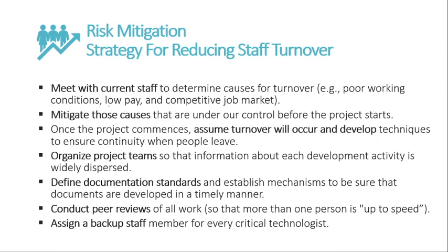It is very helpful, the most common and very helpful strategy, especially for staff turnover. Assign a backup staff member for every critical technology. This is our contingency plan.